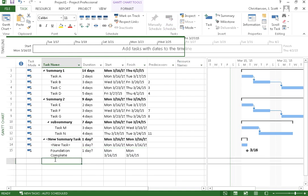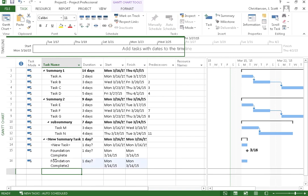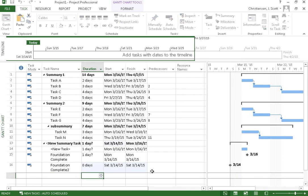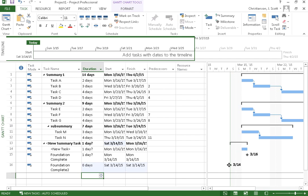You can also, let me leave that one up there and I'm going to make another example. We can also just change the duration to zero days. Okay, that will also simply make this into a milestone because a milestone generally does not consume any time on our project. Okay, so that's how we can enter a milestone in.